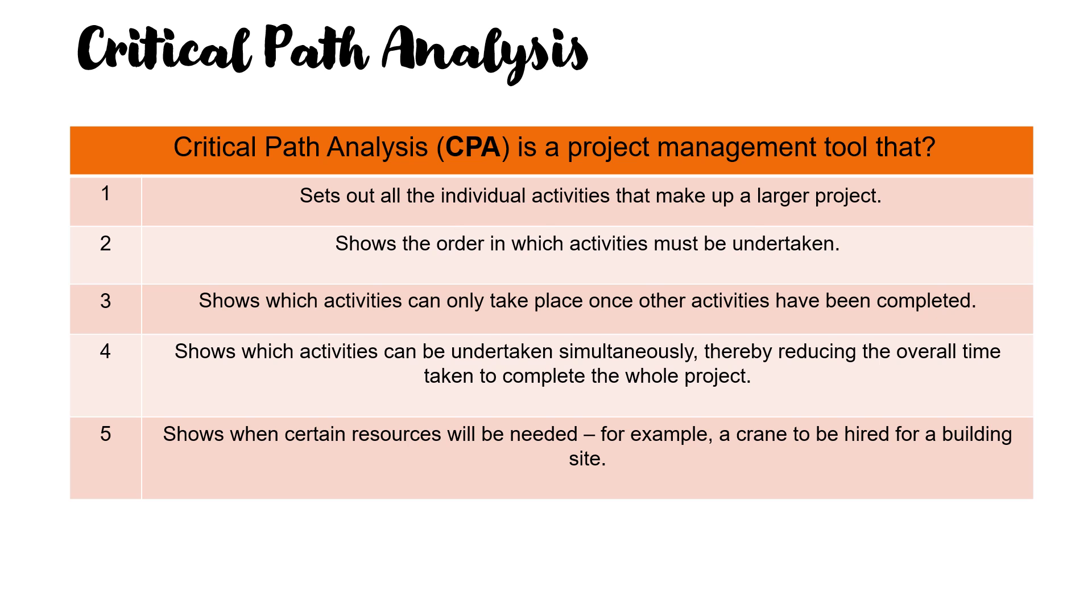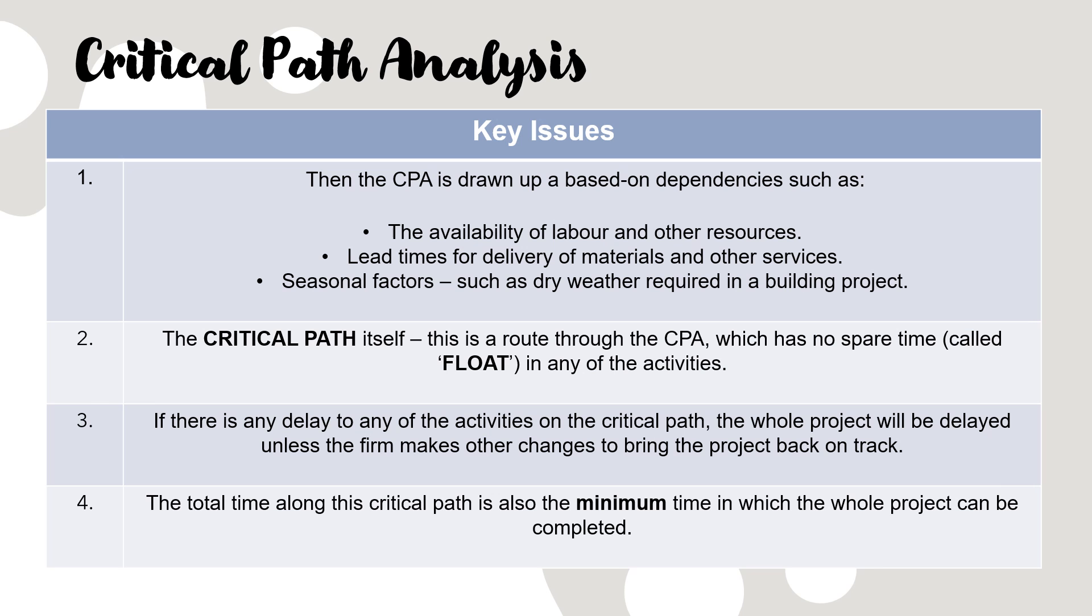So critical activities cannot be delayed. Non-critical activities can be delayed. Keep this simple - have a look at what we've got here, points one to five. It breaks it down for you. Crucial pointers: the critical path is the longest route through the diagram. That's going to be important when you come to calculate and manipulate the diagrams, which will be coming up later in the video. If there's any delay to the activities on the critical path, the whole project will be delayed.